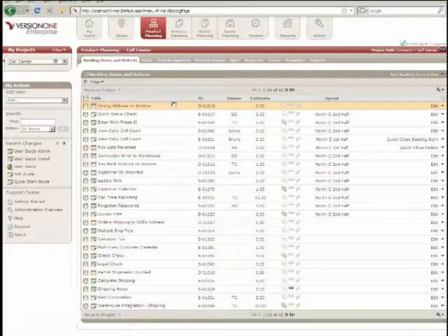Let's say we have 2-week sprints. We just put out a release and we find a couple of bugs that need to be fixed. Sometimes that happens. So it's up to the team at that point to introduce that defect and re-rank the backlog. Keep in contact with that product owner, because sometimes you might have to kick something out depending on your velocity, and deal with that.